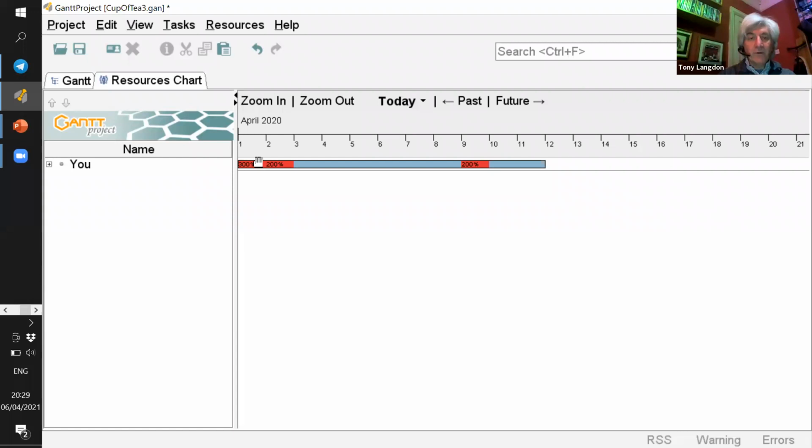So I'll just tell you that in the first minute, the number there says 300%. In the second minute, it says 200%, and in the 9th minute, it says 200%. And what that basically means is that we are asking you to do 3 times as much work as you can possibly do in the first minute. So you are overcommitted.